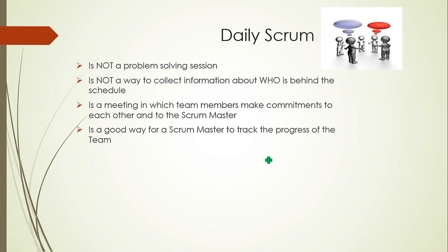So, by this meeting, team members understand where we are right now and what we have achieved till this point of time and how much work we have to finish by the end of the sprint. This helps the Scrum Master to prepare charts like sprint burn down and burn up charts.